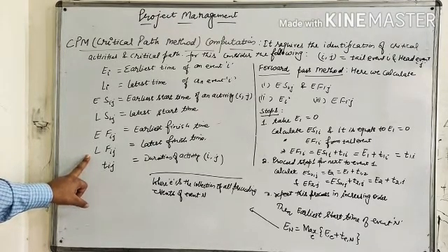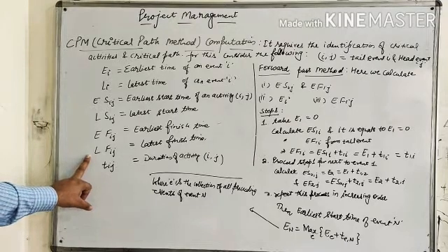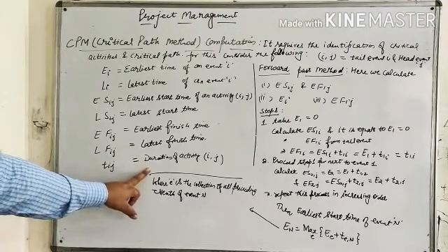It is the latest possible time by which an activity ij must finish without affecting the total project time. It is the latest occurrence time of an event j at which the activity ij terminates, and Tij is the duration of an activity.